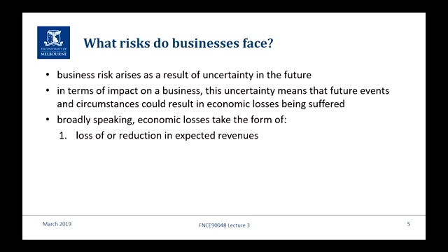Now, clearly that's a risk. So what's the risk? Our selling price goes down. That's a risk. If our selling price goes down, we don't get as much revenue. We've done all our forecasts based on selling oil at $50 a barrel, so what happens if it's $40? Then clearly our revenue goes down, in that case by 20%. Increases in expenditure. We've done all our numbers thinking that we're going to pay the labourers $28 an hour, and guess what? When we get to the time where we have to pay them, they're charging $35 an hour. Now that's a risk because those costs have gone up.